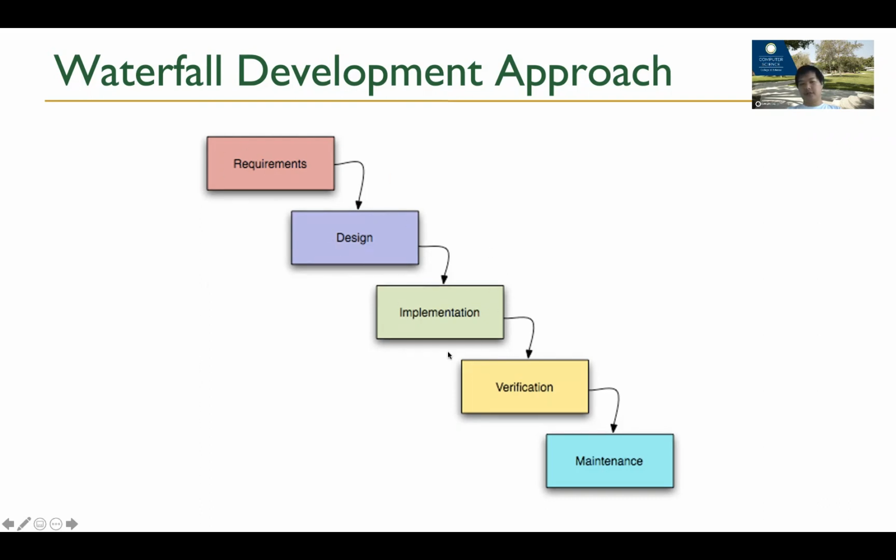And then you get to the coding. And for the coding part, you can't spend all the time on coding because you still need to test and maintain your software. So probably, you spend half a year to actually do the implementation work. Everybody works hard, just writes the code, gets it done. And that's a total of 9 months. And after that, you spend 1 or 2 months to test and verify your software, because that's a lot of code. And then if everything works, you use the remaining 1 month to deploy it and deliver to the customer, right?